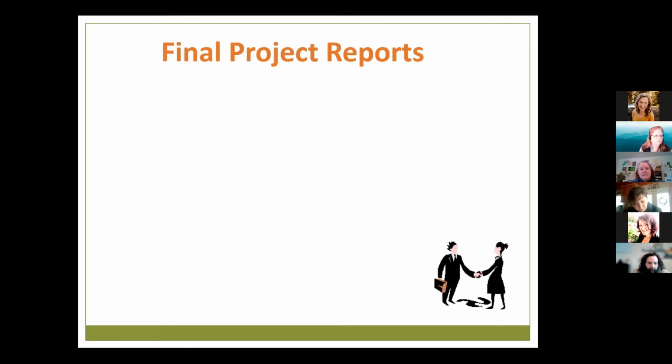Okay, so I've got some tips on project reports, and I'll go through this, Leah, and then I'll see if you have any other information to add. So most final reports ask for something called a budget versus actual. So the budget is what you think things are going to cost and the money that you think you're going to bring in to do the project. The actual is the accounting or bookkeeping of what it actually costs. And so your plans can really change, and the actual cost might be very different than the budget costs. I'm going to show you a budget to actual document in just a minute, and we'll talk a little more about that.